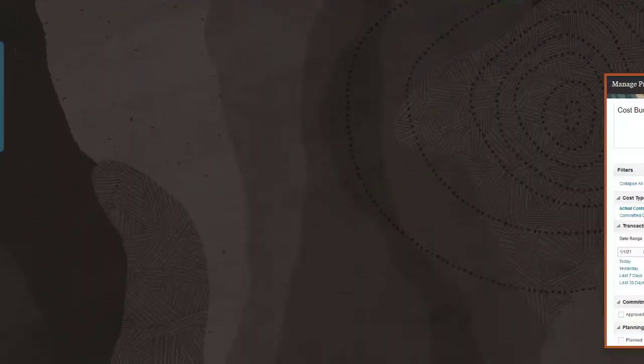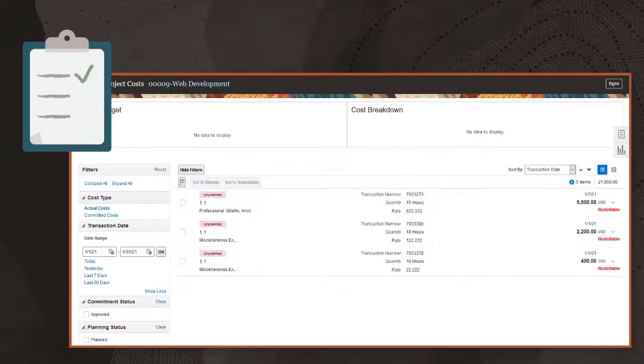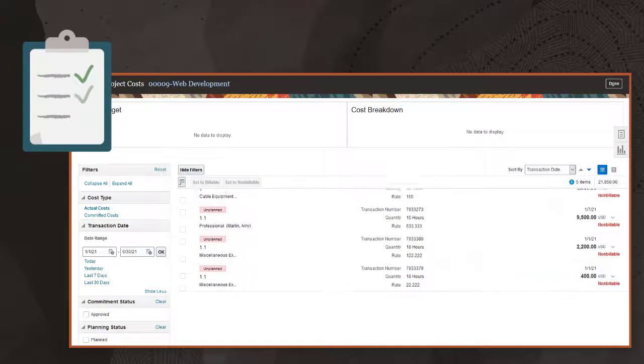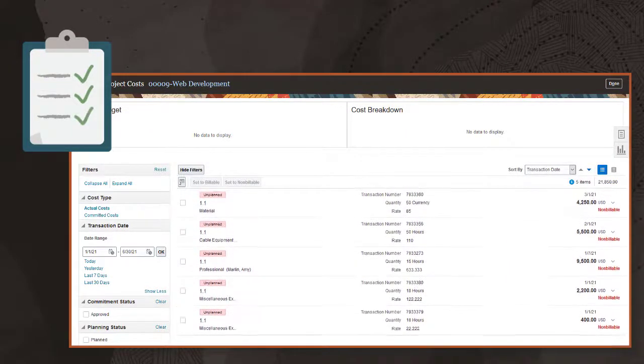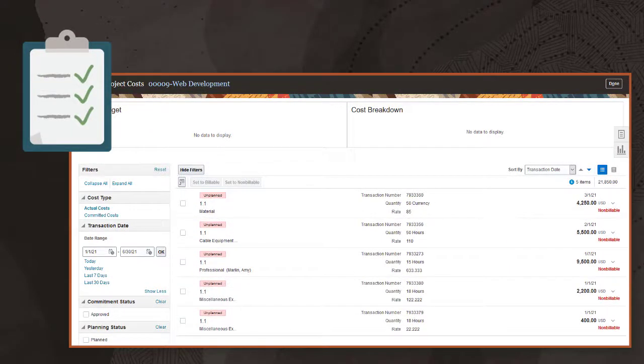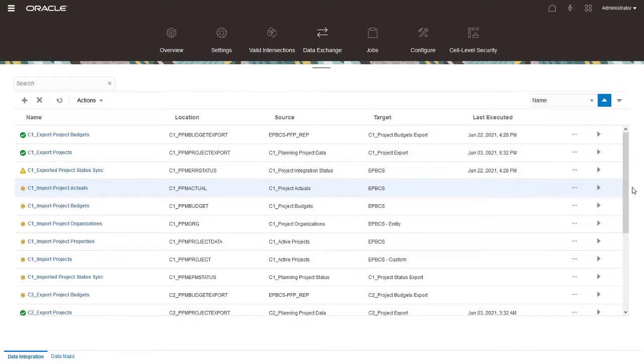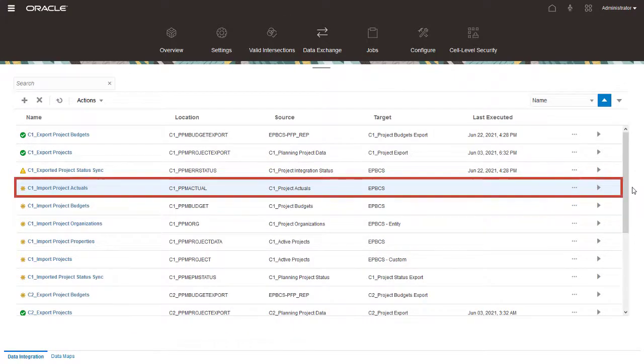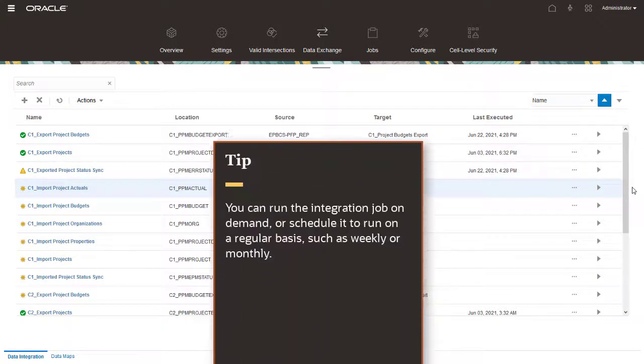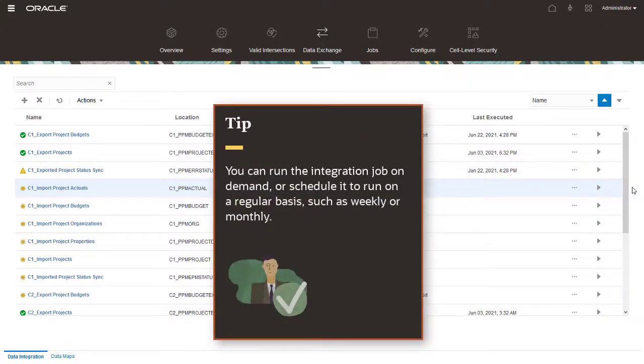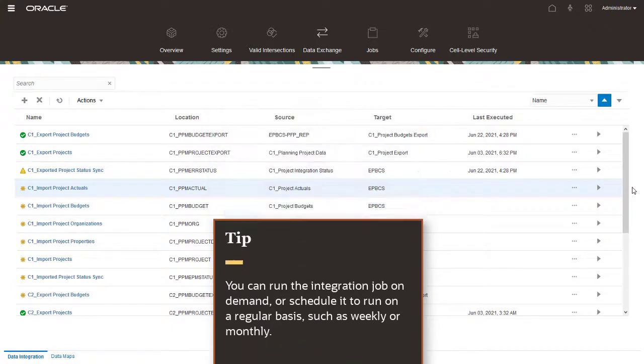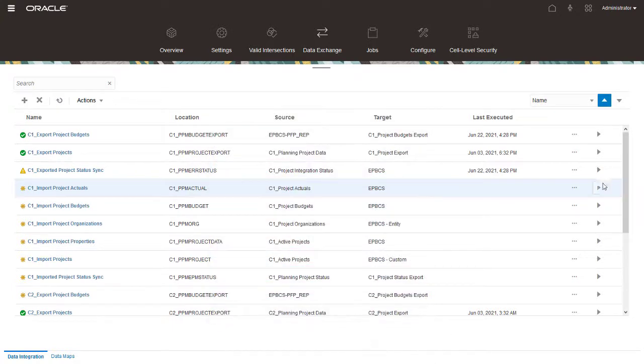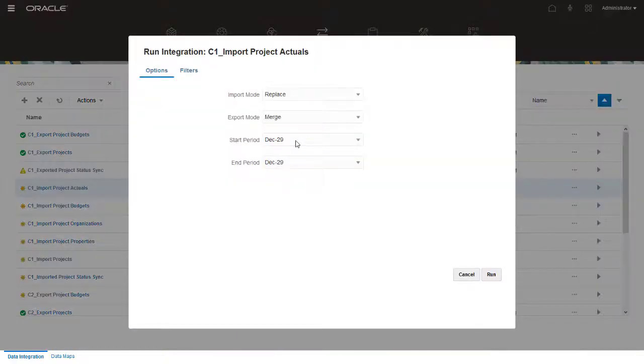As the project is executed over time, actual transactions are collected in Project Management. Periodically, EPM project planners or a planning administrator can import these actual costs from Project Management to EPM Planning. You can run the integration job on demand, or schedule it to run on a regular basis, such as weekly or monthly. Let's run the integration. I'll import the collected actuals.